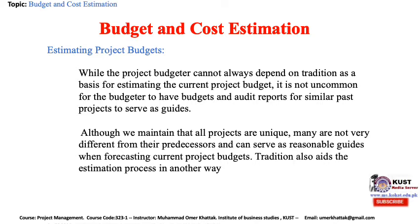The project manager must be aware of both the resource requirement and the specific time pattern of resource usage. Another important aspect of preparing budgets is that every expenditure or receipt must be identified with a specific project task and with its associated milestone. Referring back to the WBS, each element has a unique account number to which charges are accrued as work is done. These identifiers are needed for the project manager to exercise budgetary control. The issue of how to gather input data for the budget becomes a matter of some concern.